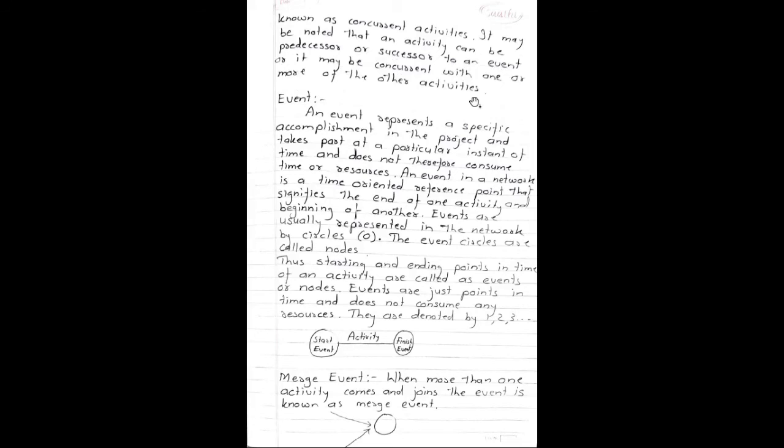Next definition: Event. An event represents a specific accomplishment in the project and takes part at a particular instant of time and does not therefore consume time or resources. An event in a network is a time-oriented reference point that signifies the end of one activity and beginning of another. Events are usually represented on the network by circles. The event circles are called nodes. Thus, starting and ending points in time of an activity are called as events or nodes.